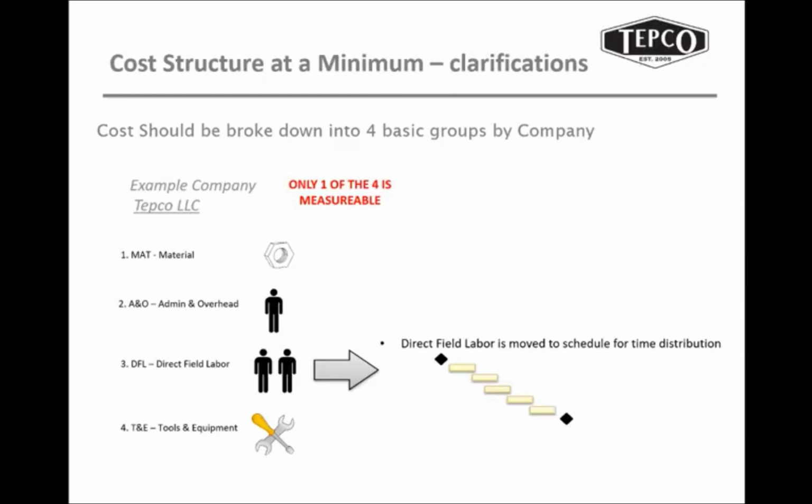And we're setting ourselves up for a couple of different things here. First off, for change management. If something does change during the turnaround, it can clearly be reconciled and looked back on the original bid to see what was bid. But the thing we're really looking at from a forecasting and cost perspective is the ability to do what we call a cost performance index. Are they earning the hours per day per shift based on the time that they're charging me per day per shift? So we're measuring the progress and seeing the earned versus the burn, and the earned versus the baseline schedule, to see if we're going to finish on time.